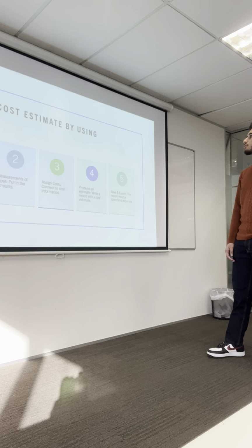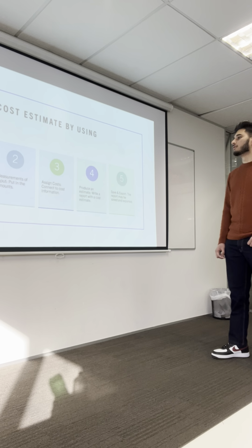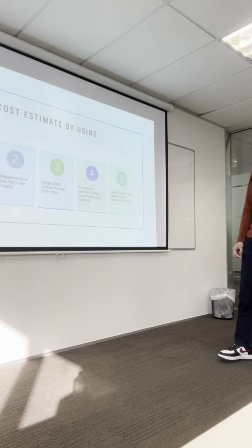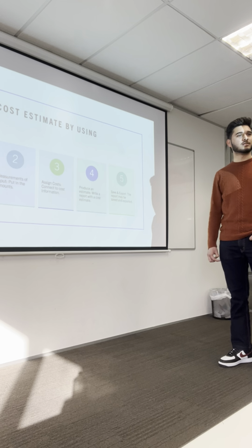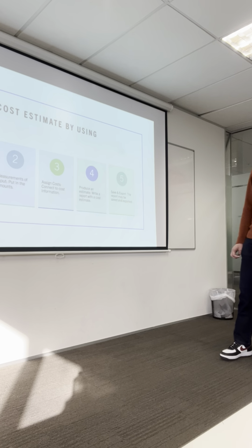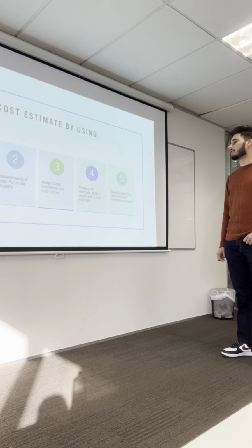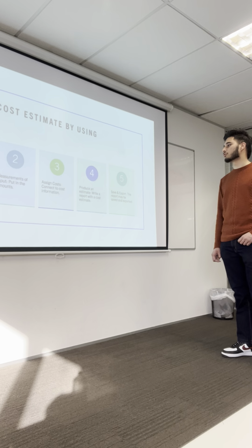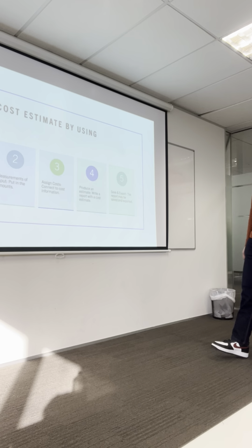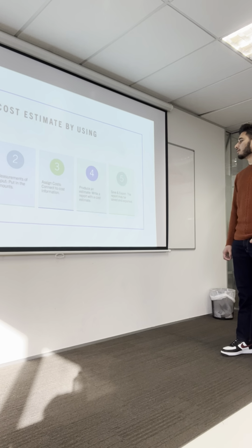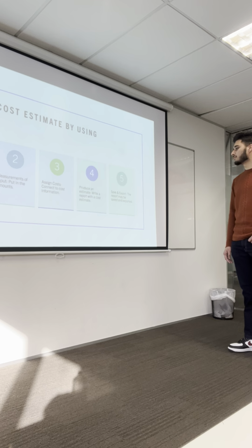Next is preparing a cost estimate by using Costex. In the first part we start the project and gain access to Costex, and the second part is measurements input, putting in the amounts which are required for the buildings. Third is assign cost, connecting to the cost information gathered from the market and different areas. In the fourth part we produce an estimate, writing a report with the cost estimate. Fifth, save and export: the report may be saved and exported.